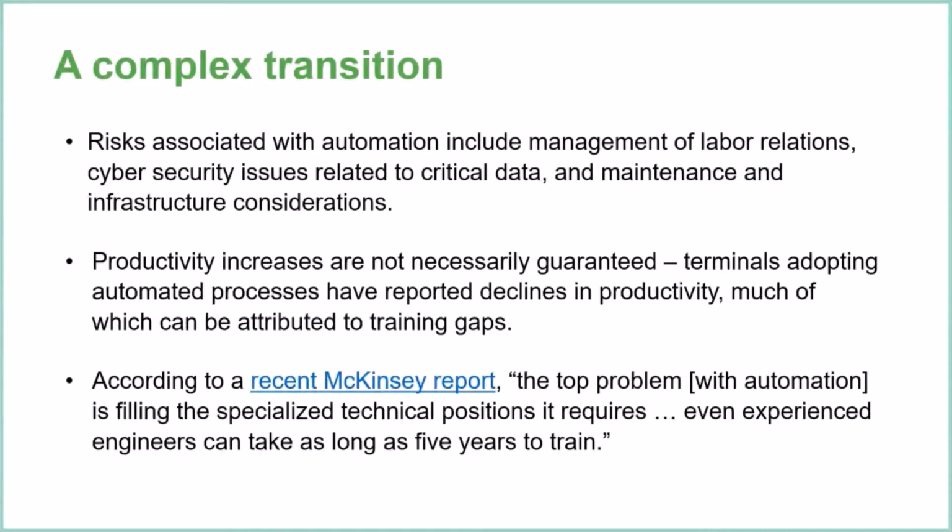So the complexity was that these were procured from 3 different suppliers that the terminal operator would need to make work together and ensure a smooth transition between the various software systems, equipment and hardware. That was a very difficult process.